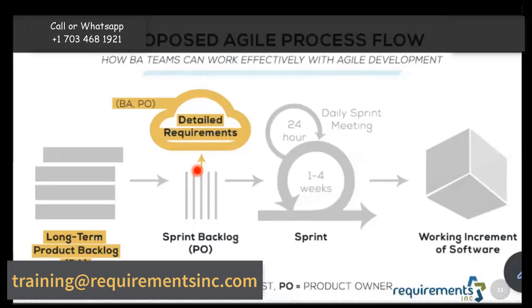And when in doubt, you probably have to go with the higher one. And if one person is saying 2 days, another person is saying 7 days, then you have more discussion to do as to why that discrepancy. Is the person saying 2 days oversimplifying it? Or is the 7 days person misunderstanding something? Make sense?